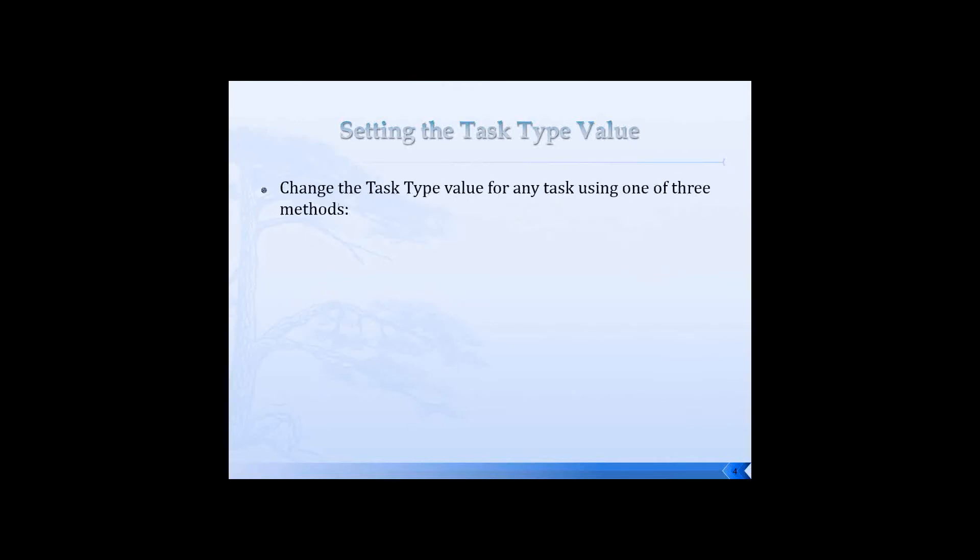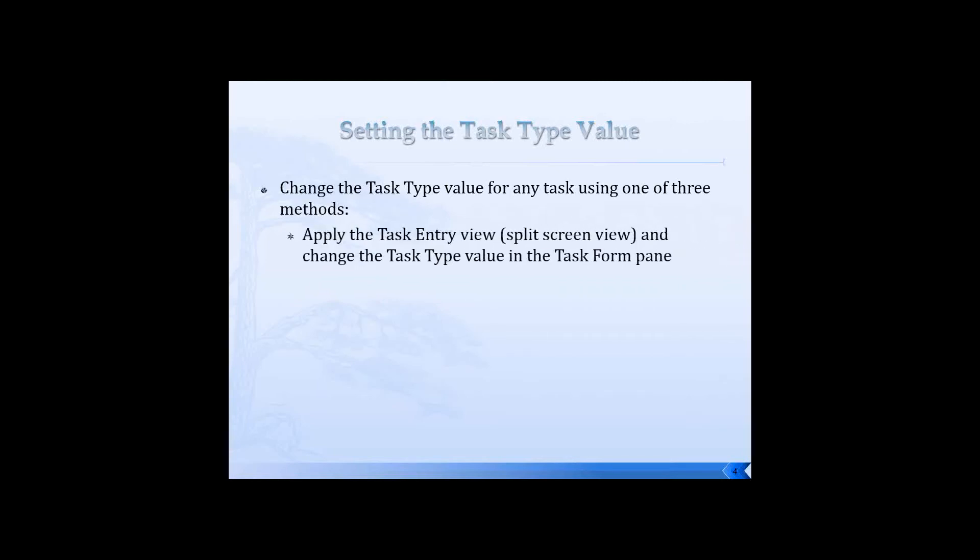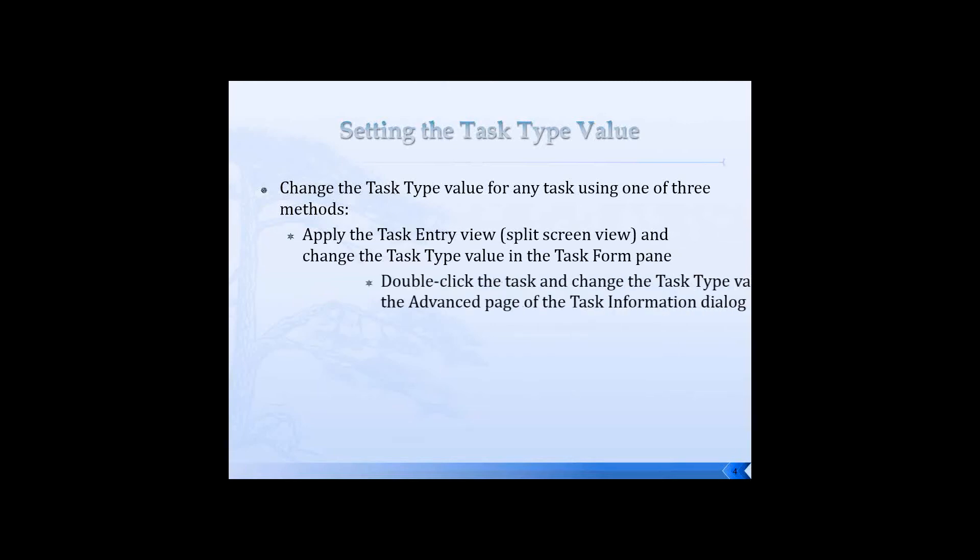In Microsoft Project, there's actually three ways to change the task type value for any task. The first method, this is the one that I usually use personally, is you apply the task entry view, or the split screen view, and then you can change the task type value for the task in the task form pane, which is at the bottom of the screen.